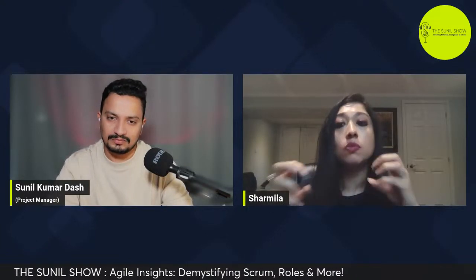So basically, in Agile, we are dividing the projects into very small segments of work and trying to deliver them through sprints. What we are trying to do is to satisfy the customer through early and continuous delivery. We are not saying that we are going to deliver the software at the very end of the project. But we are saying, okay, we need to develop this software, so let's go part by part. Let's first develop the APIs or the front end part of it, and show it to you, and let's know what you as a client think of it, and then go to the next phase, incorporating your feedback, so that we can provide the utmost value based on your requirements.